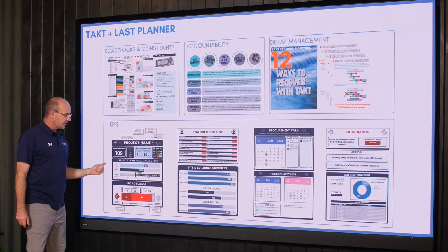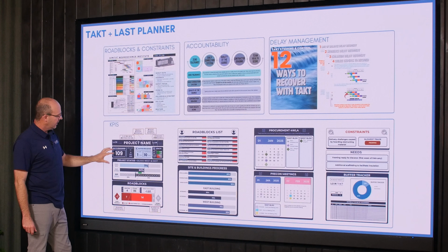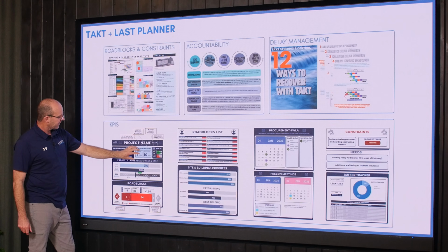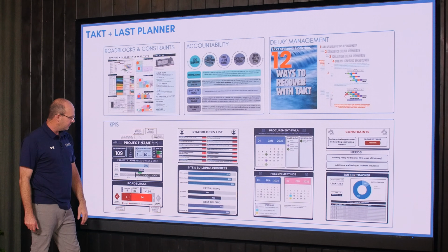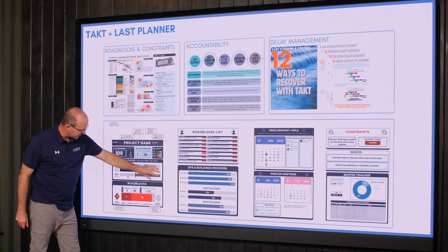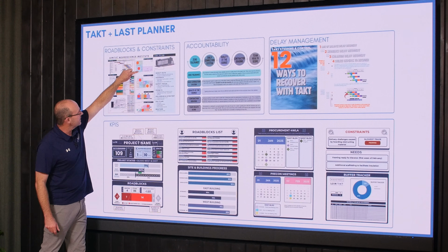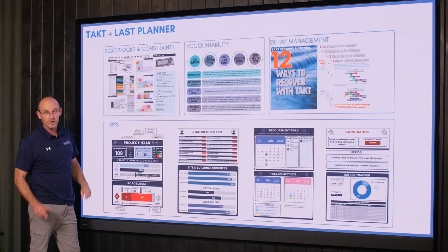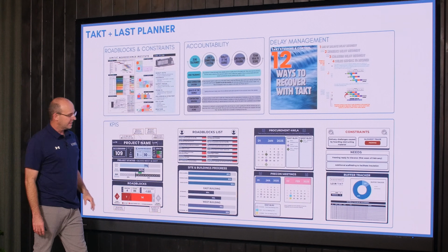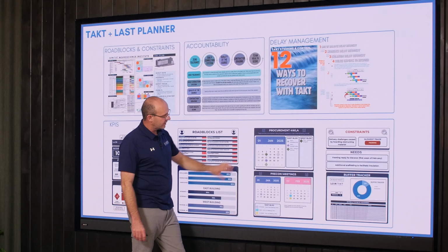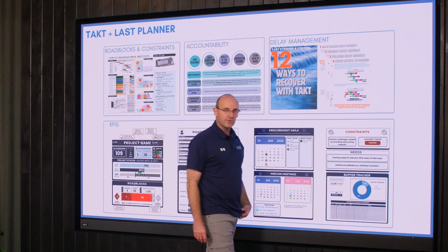One of the cool things that you'll get in the Takt production system is the email. It will report out with days remaining, the remaining buffer, the end date, 4 different KPIs that you'll love, how many buffers we have left, and the key roadblocks that we're focusing on. As a trade, it's the red items that you're focused on, the roadblocks, with the project team to clear the way. This email will also give you detailed breakdowns for what's coming up next and any constraints that you and your team are dealing with.